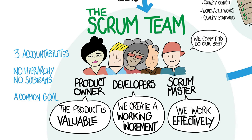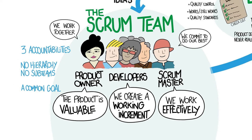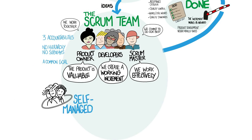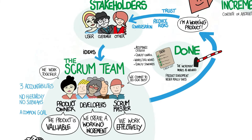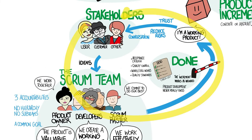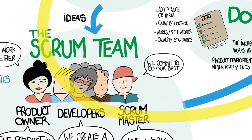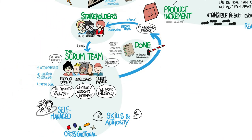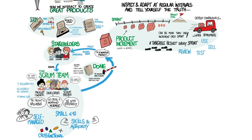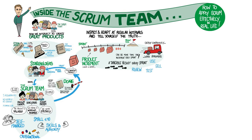Developers are accountable for creating the increment, the product owner is accountable that the increment is valuable, and the scrum master is accountable that people can work and collaborate effectively. The scrum team solves the problem together — they organize and manage themselves. A scrum team is cross-functional, meaning it has all the skills and authority necessary to transform incoming ideas into something that is done and valuable, including making decisions about the product. Typically a scrum team has 10 people or less. If the team gets larger, effectiveness usually declines. Conversely, a small team may not have all the skills needed, especially if someone goes on vacation or gets sick.